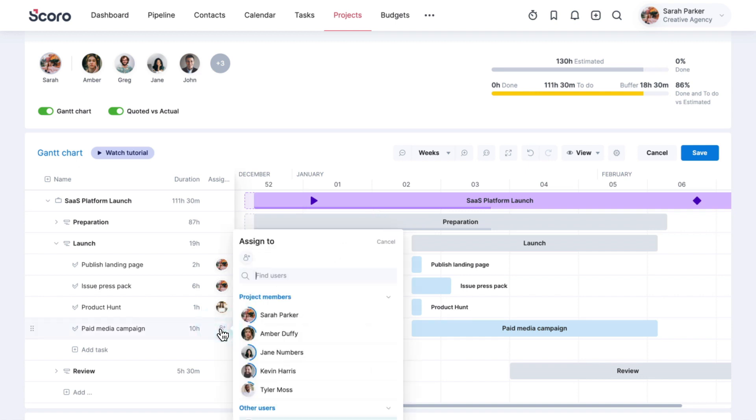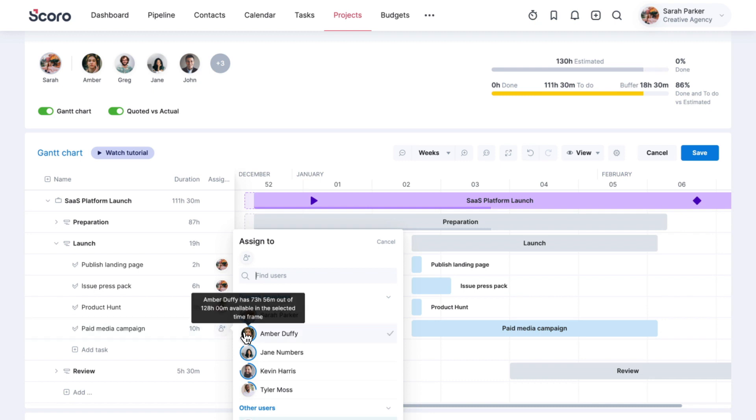Use the assignee column to choose the team member responsible for a specific task. An availability indicator around the team member's avatar indicates their general availability. Hover over it to see the available hours and evaluate if they can complete the task in the given period, or if you should assign it to someone else.